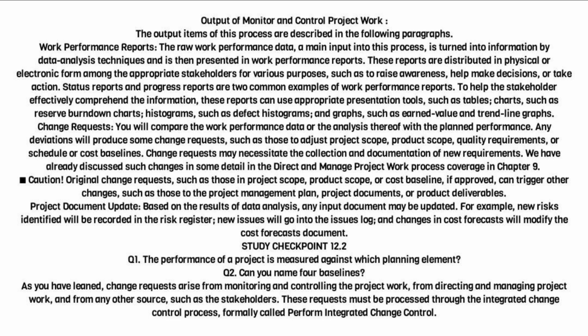We have already discussed such changes in some detail in the Direct and Manage Project Work Process coverage in Chapter 9. Caution! Original change requests, such as those in project scope, product scope, or cost baseline, if approved, can trigger other changes, such as those to the project management plan, project documents, or product deliverables.